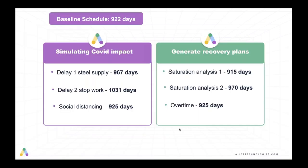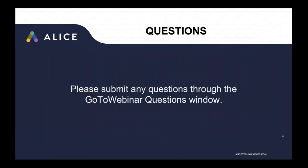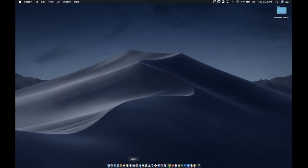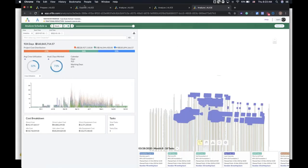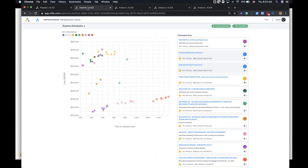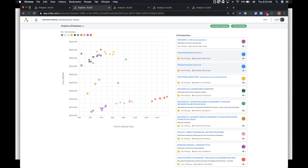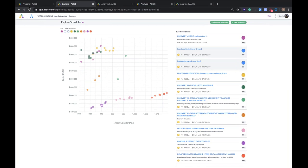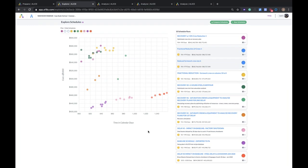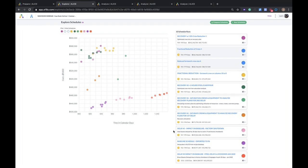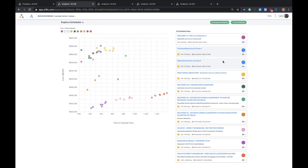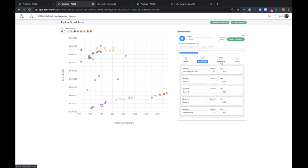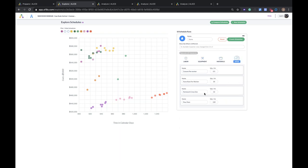And then we started looking at how we could achieve those 925 days while reducing the amount of workforce on site. And we found that we could actually make reductions of 10% on the workforce while still preserving the schedule. And then with 20% reductions, we could get within 10 days of the baseline schedule. Now I'm going to jump over to ALICE and actually show you this in the software.